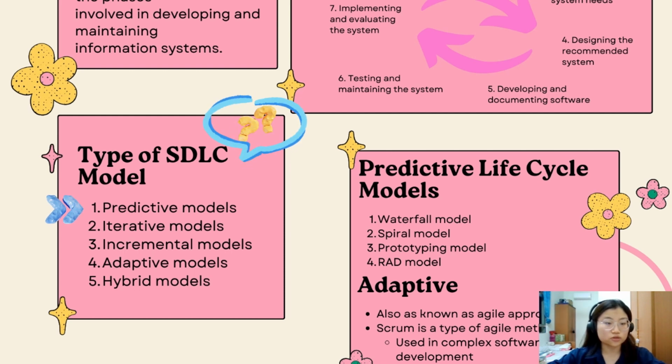First, in the predictive model, the scope of the project can be clearly articulated and the schedule and cost can be predicted. In the iterative model, the scope is determined early, but time and cost estimates are modified as the understanding of the product increases. In the incremental model, deliverables are produced through a series of iterations that add functionality within a set time frame. The deliverable is not complete until after the final iteration.